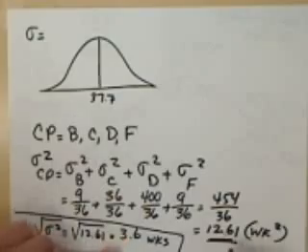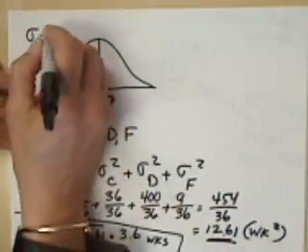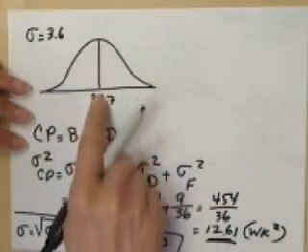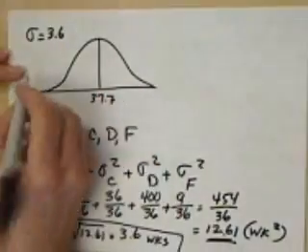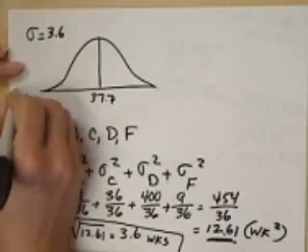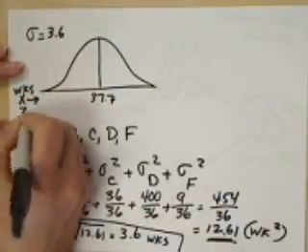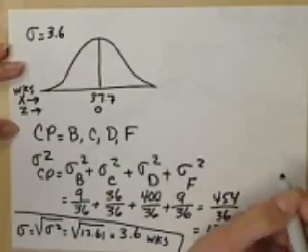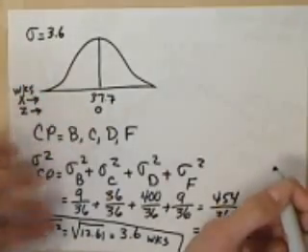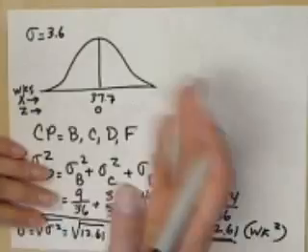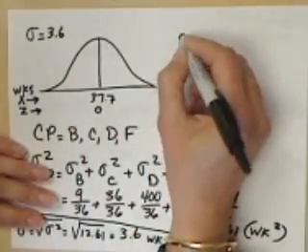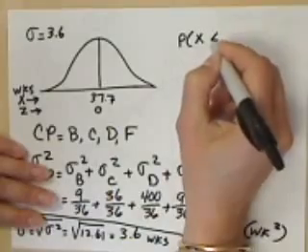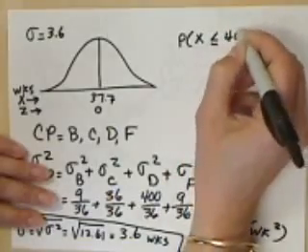So now we have a project which on the average takes 37.7 weeks on the x-axis, which is in weeks, and on the z-axis the z-value is 0. So we can compute various probabilities. For example, what is the probability that x, or project time, is less than or equal to 40 weeks?